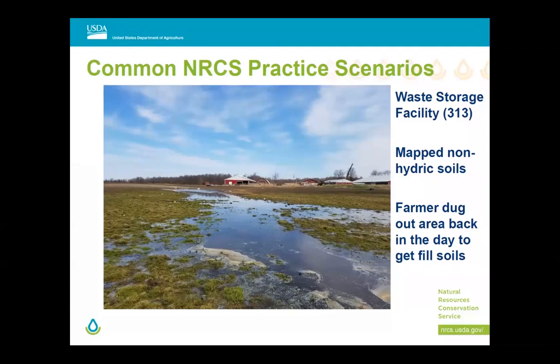Okay, last question that I can find: 5,000 square feet of disturbance triggers Army Corps of Engineers, but sometimes smaller areas could be a trigger depending on the specific situation. So that's getting at the general permits that the Army Corps of Engineers has. It depends on the region that you're in, because oddly enough, permitting varies by region with the Army Corps of Engineers. So you need to be aware of the general permits that exist, and then they have different levels